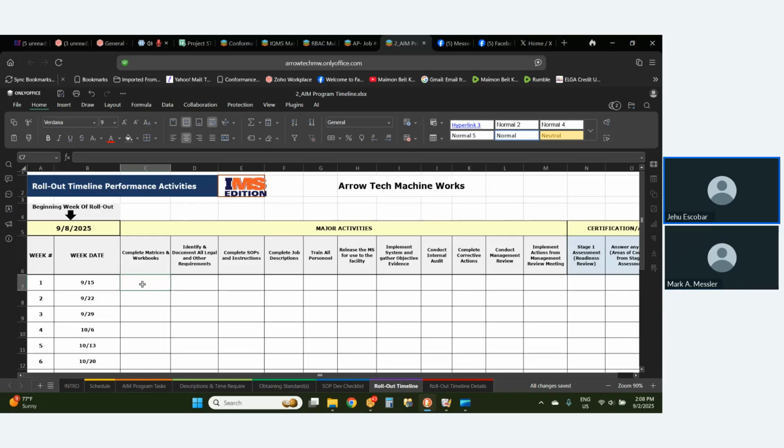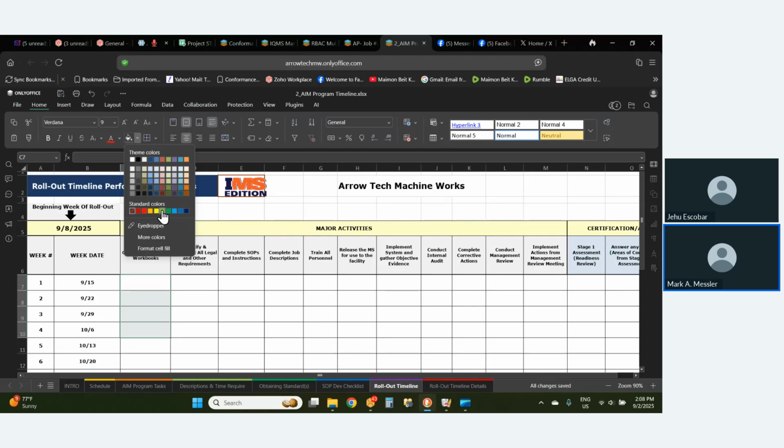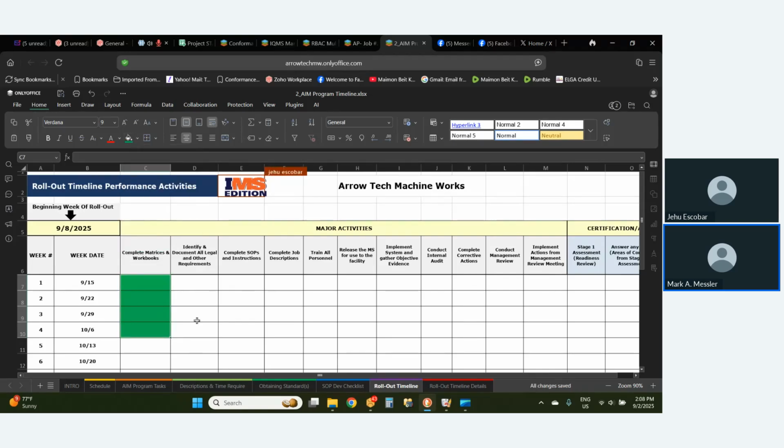Going off of the 9/8 date, it depends on how long it's going to take the insurance to get back to us. Exactly. If you think it's going to take a week, their priorities aren't the same as yours. Correct. I would give myself 4 weeks, just because if it's not the insurance company, then you're going to have to get a hold of SBA. So be conservative.